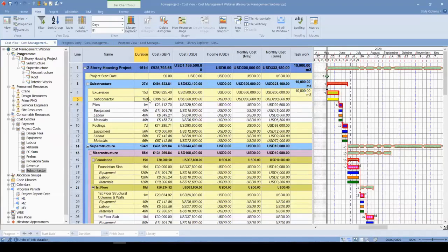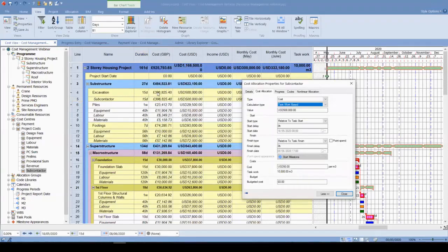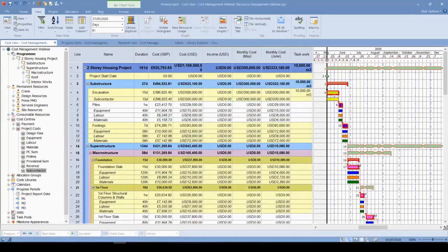Now, let's go back a little bit, and by this way we can always generate more realistic cost information, or we can use the fixed cost. If we know the cost of this activity, of course, we could calculate this in any other way. So if we know the total cost of any activity, we can directly choose the fixed cost and then input this data. It is not going to depend on any other parameter.